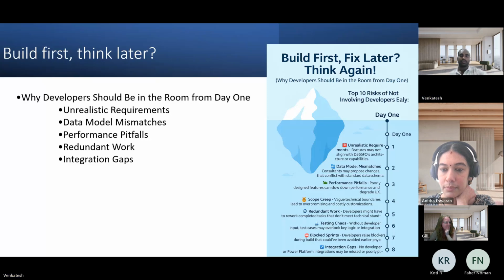But the problem is reversing that free text invoice or canceling it. The system also needs to capture that field. This scenario is very important for the functional to ask the business, and how it should impact must also be communicated to the team on the technical side. So make sure your scenarios are elaborate and cover all these kinds of scenarios. You will have very few changes and happy customers. Visualize it so that your requirements are clear.